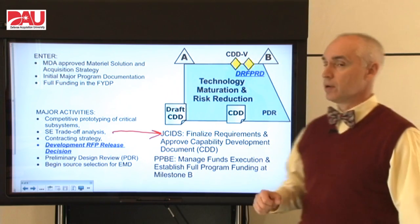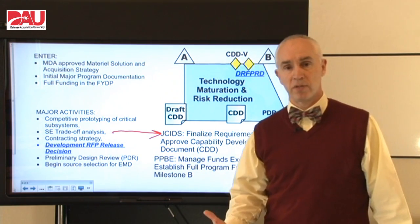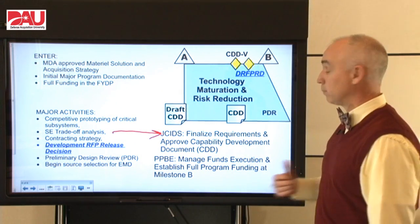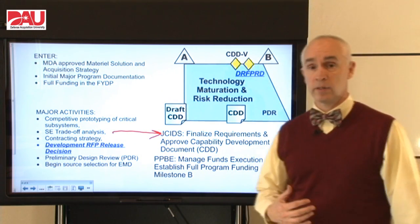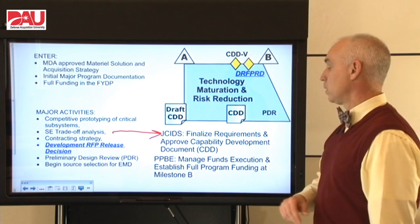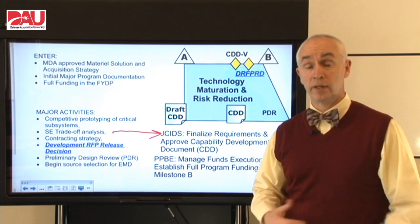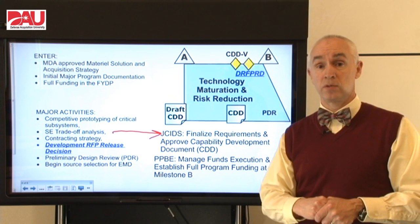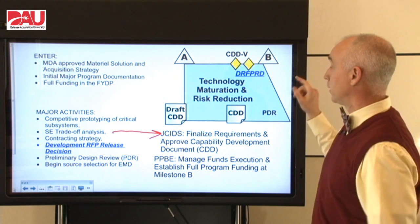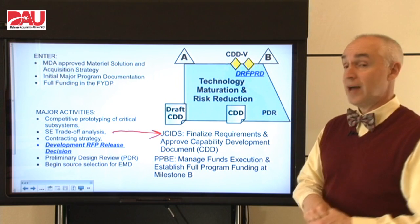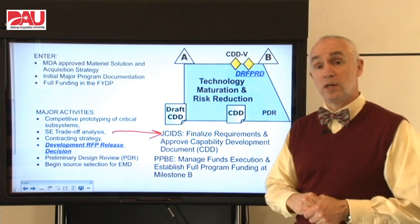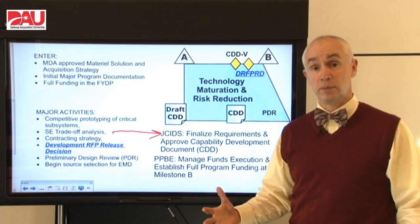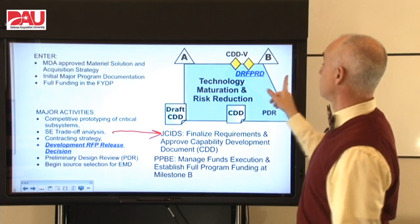Financially, we've got to manage our funds execution — how we are obligating and expending our funds — and we also have to make sure that we have full funding for the program in the out-years when we hit Milestone B so that we're in that Future Years Defense Program again. Once we have matured our technology and retired the program risk to an adequate level, we're ready for Milestone B and the next phase.